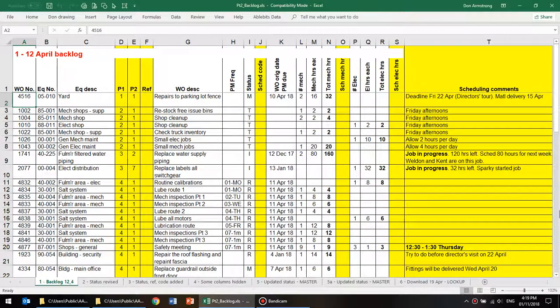Of course, urgency has nothing to do with the availability of materials or people. Now, if a job's truly urgent and materials aren't available, we'll do something else like fabricate parts or connect standby equipment and so on. Just don't move the job on the list because materials are available. Materials don't affect its priority at all.